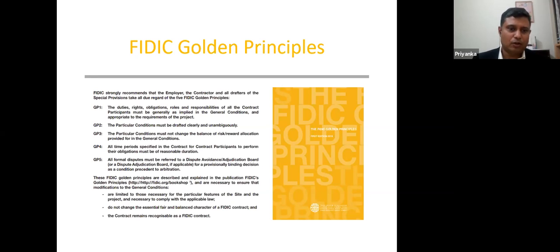So number 5, all formal disputes must be referred to a dispute avoidance and adjudication board for a provisionally binding decision as a condition precedent to arbitration. Now, it says dispute avoidance and adjudication board. However, the FIDIC 99 users know about that most of the time, that we avoid the extra fee that is being paid to the dispute adjudication board, and we allow the engineer to do the same. So these sort of things are happening, right? So in the special provisions, they change that one.